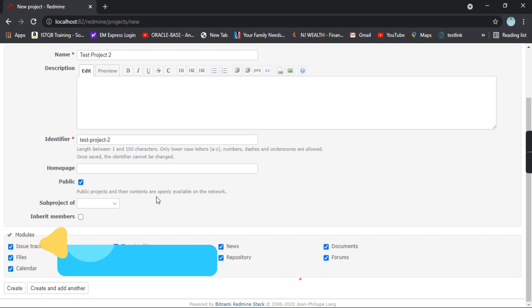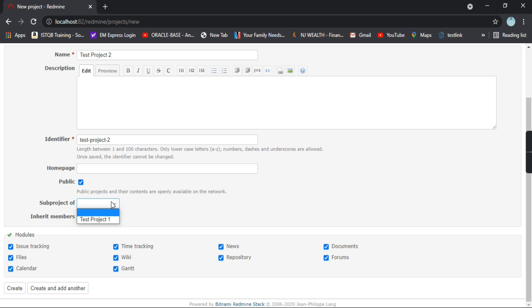Now if your project is a part or a sub part of any big project, you can select this option as well. Suppose test project 2 is a part of your test project 1, so you can select as test project 1.